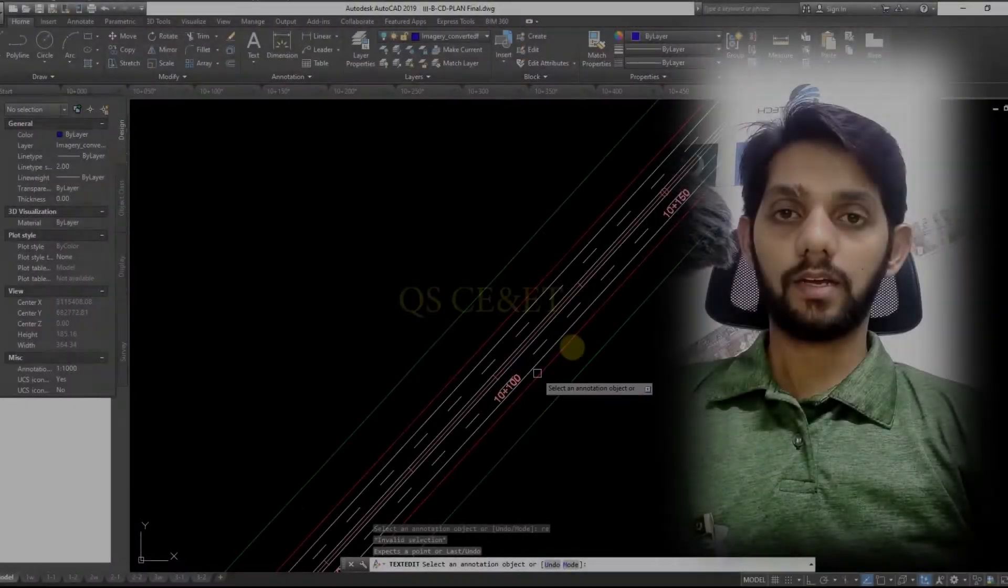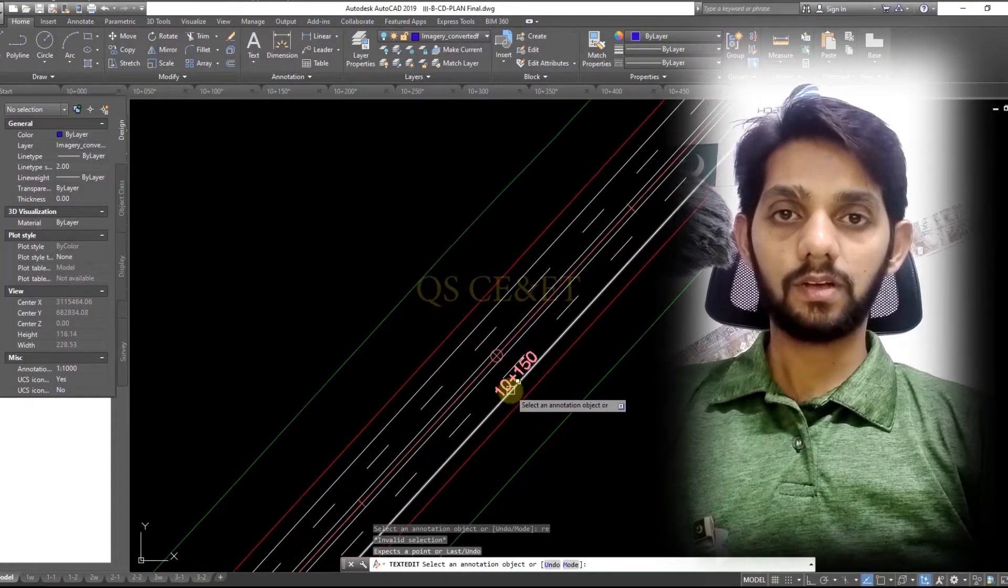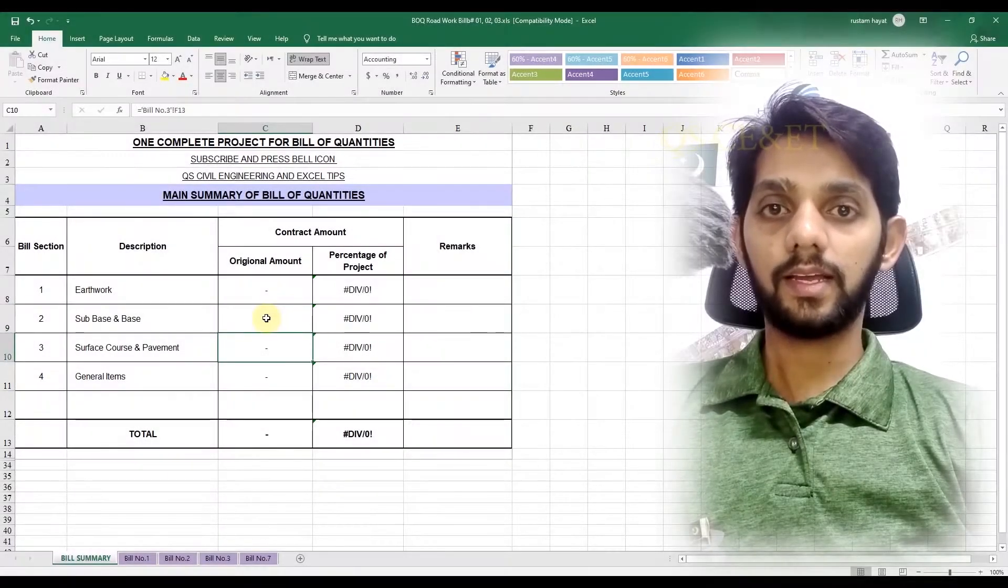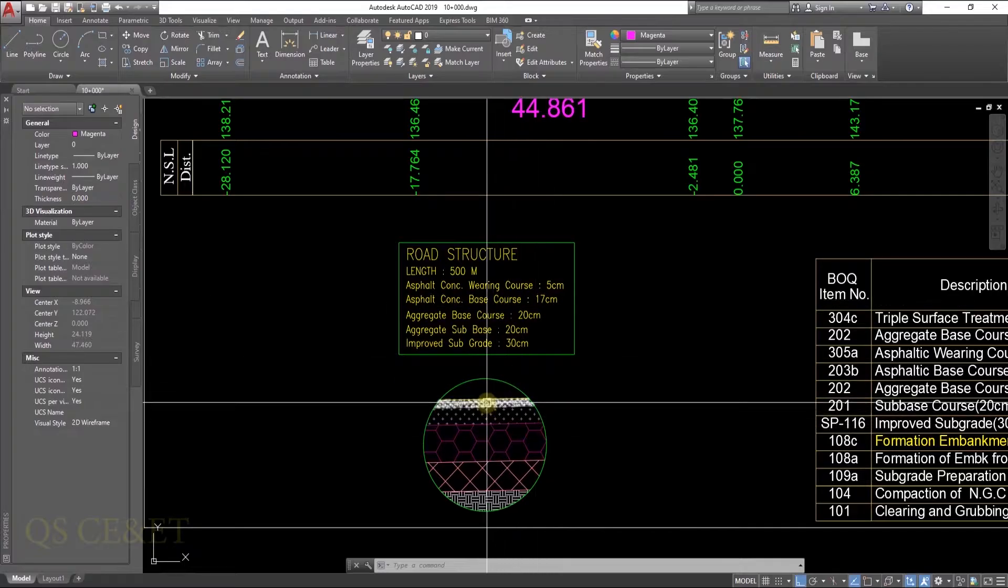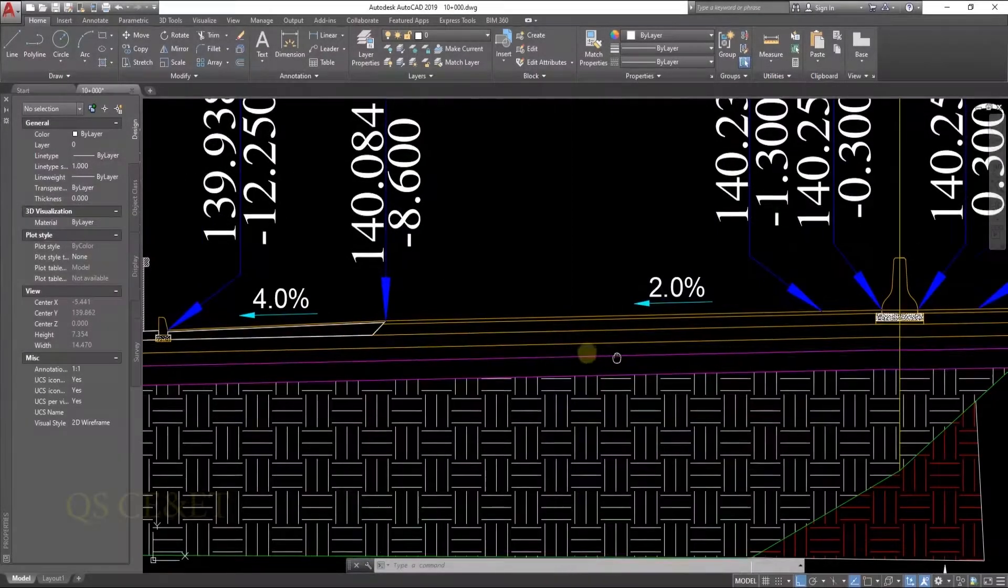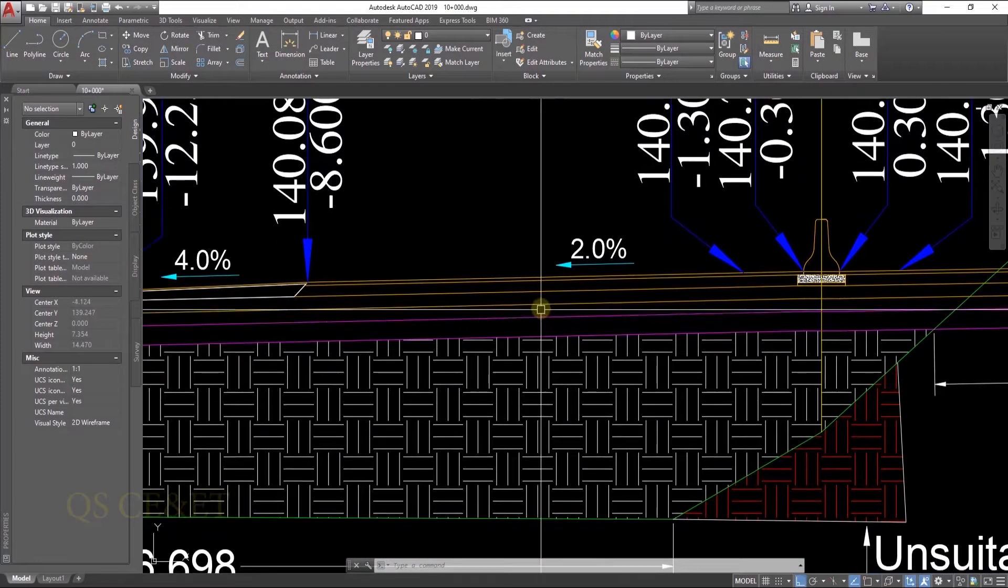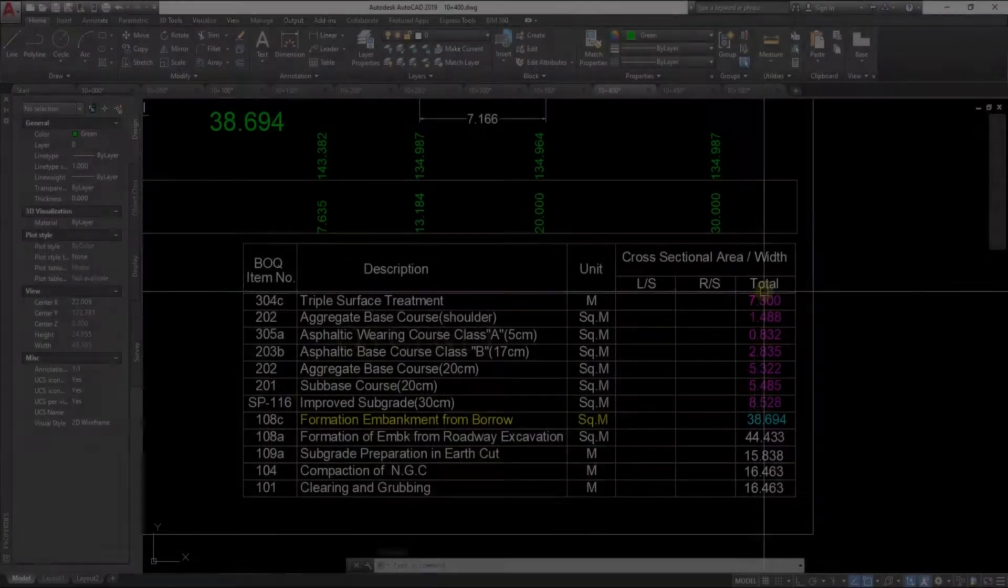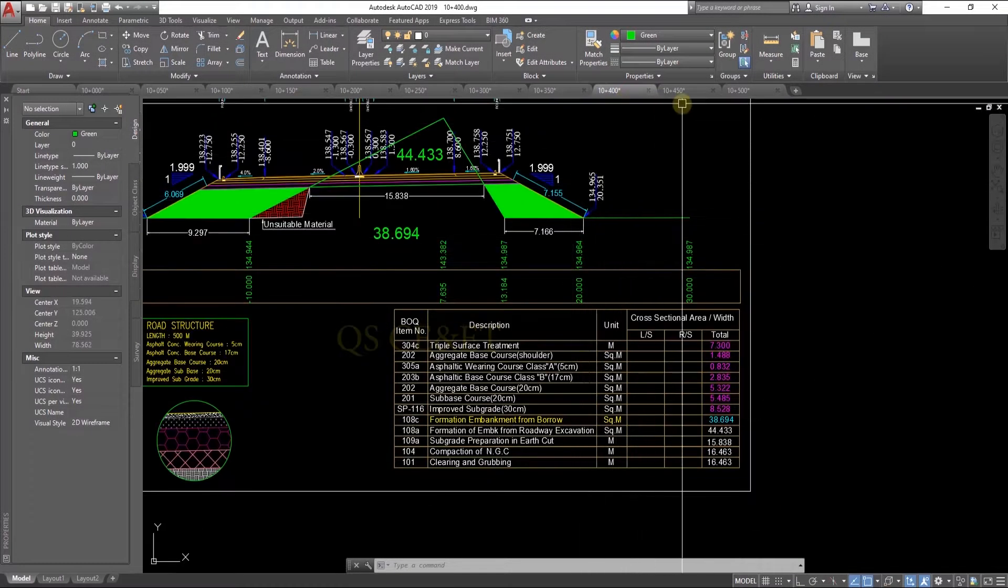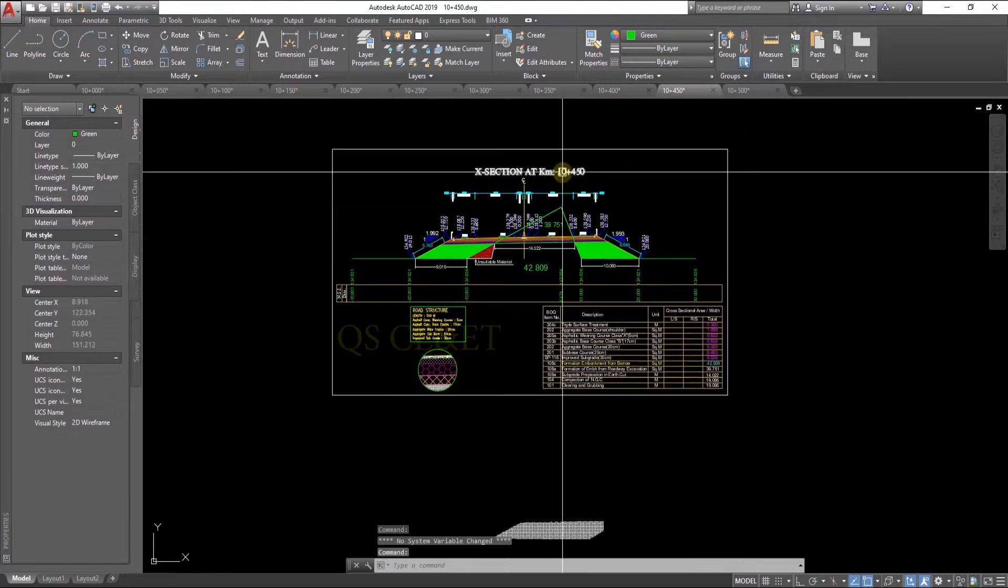I specially created this content for you, a new project of 500-meter road, and I will cover all major items of road. I will link the measurement sheet to the main cost summary. Asphaltic base course 17 centimeter and asphaltic bearing course 5 centimeter. Now we are going to calculate the asphaltic bearing course.